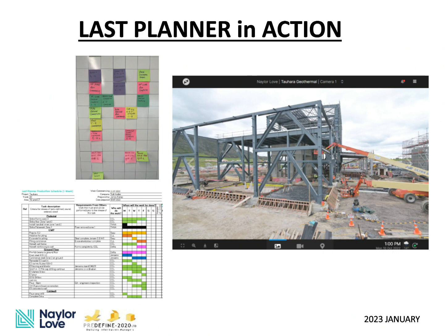Locations. In practice, this means that the location, the area of work, is represented on the planning board of the project, both by description, for example, grids and levels, as well as mimicking location. For example, floors shown up or down on the board according to their physical position.